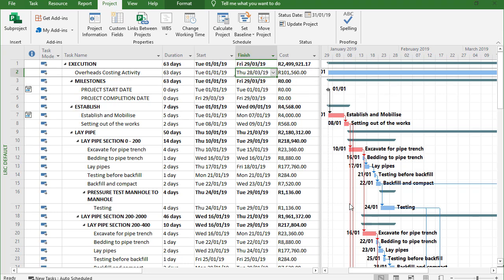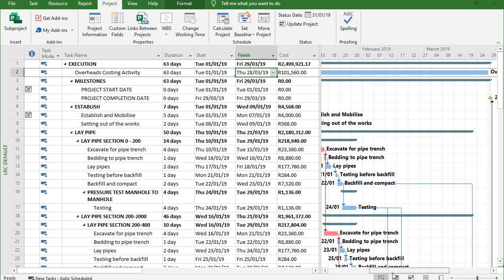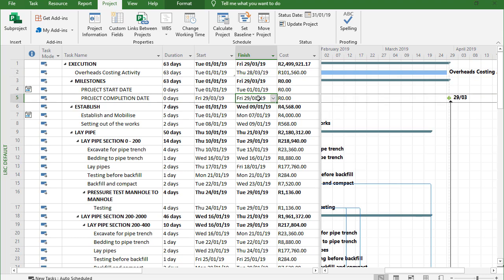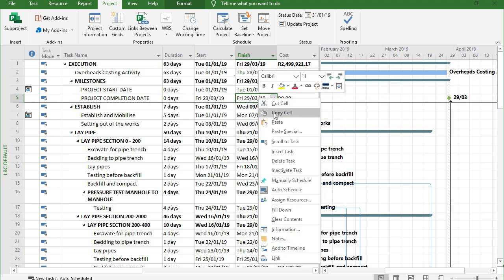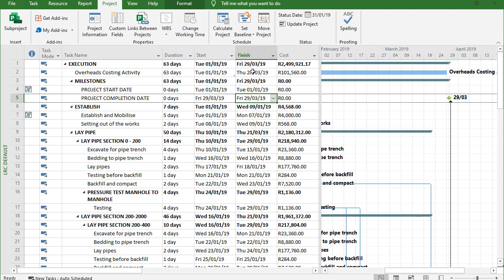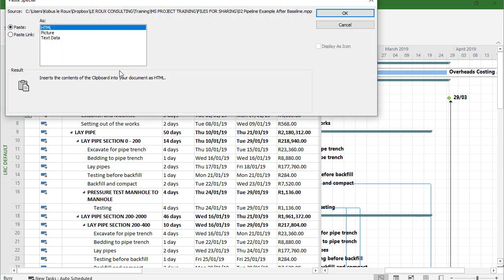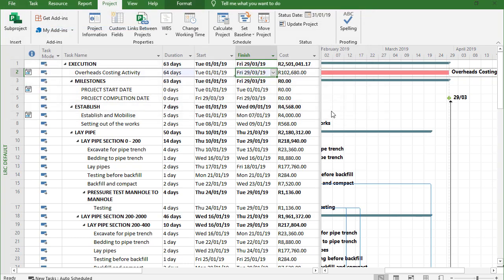And the same thing with my project completion date. So can you see that I'm grouping now a range of unrelated activities under one heading of overhead costing. So I'll take that completion date, copy the cell, paste special, and then click on paste link, OK.